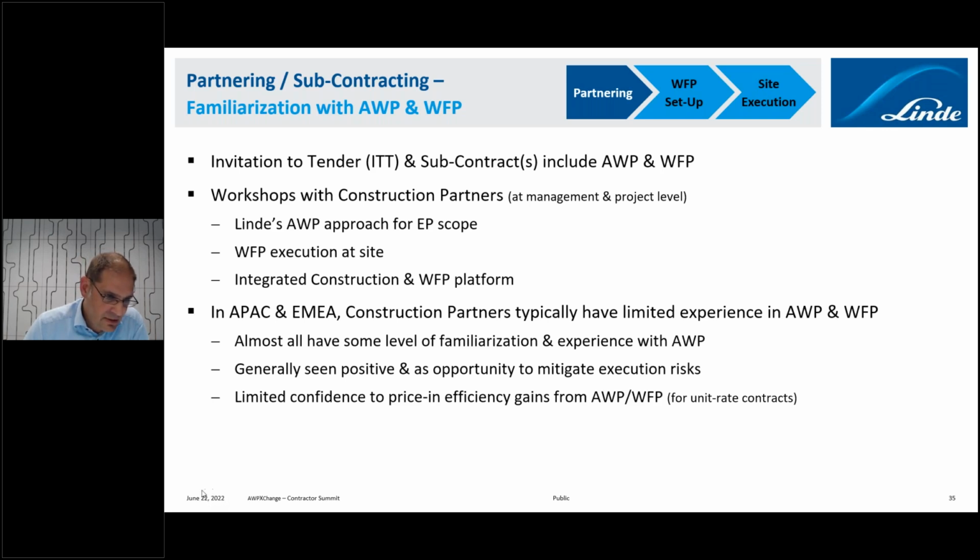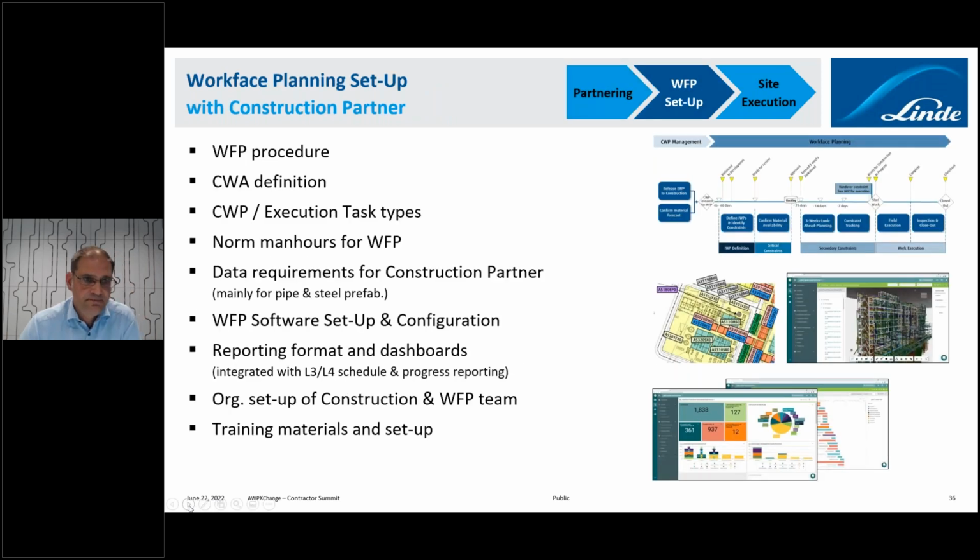So now I would like to come to the work phase planning setup. So this list here is kind of the key bullet points which we run through and align with our construction partners during the work phase planning setup. So we have kind of standard work phase planning procedure, but at the end, this work phase planning procedure is issued by our construction partners. So we walk this through, we align it with them. We, of course, build in the specifics for the project.